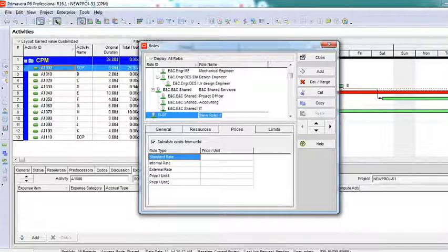It could be a vice president, general managers, or anybody from your top level who is in multiple roles, a person performing two or more roles. That particular person has to be created as a resource, and then everything he is performing has to be created as roles. Understood? Very simple.